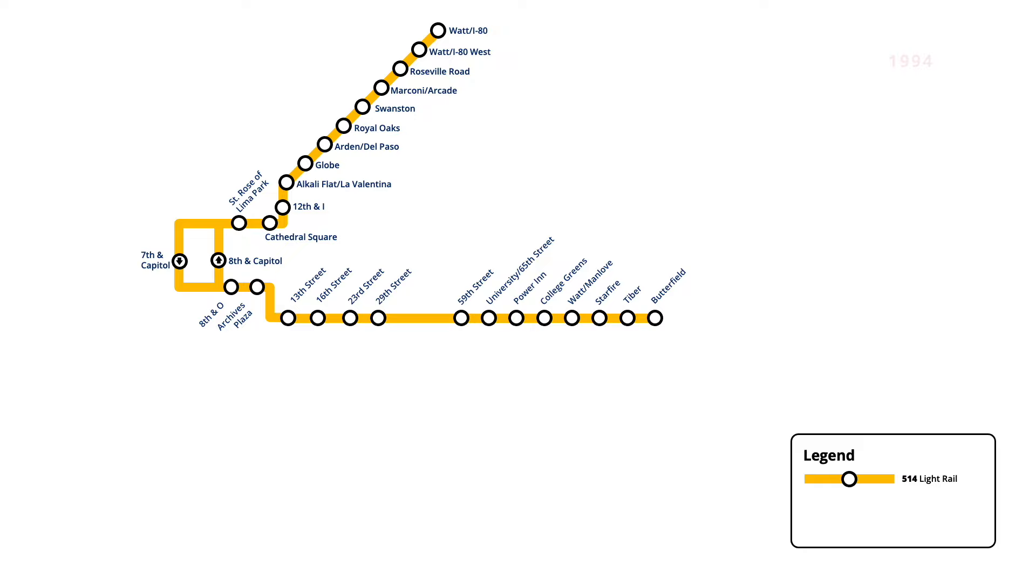In July 1994, two new stations were added at 39th and 48th Streets, improving access to the system from East Sacramento. While these stations were included in the original light rail plan, protests from local residents saw their construction delayed.